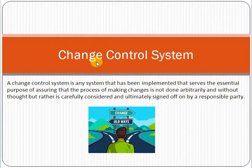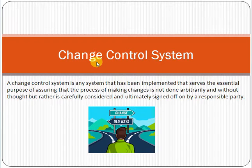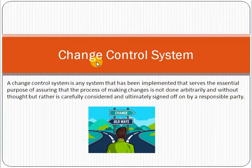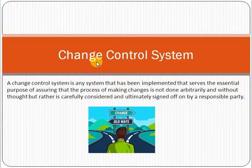Because implementing something at production means the customer will start using it, you need a procedure and mechanism through which that change goes to the production system. Some authorities and sign-offs will be required. Once the authorities approve that the change is okay — that quality assurance is complete, it is properly tested and verified by the user — then we implement the change at production.